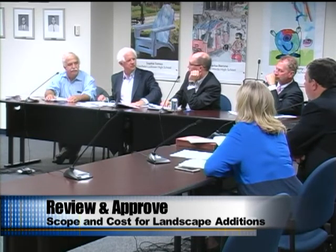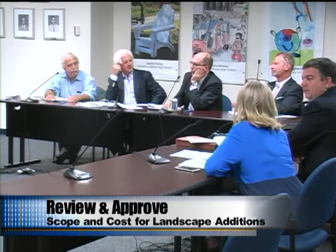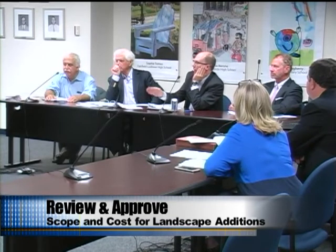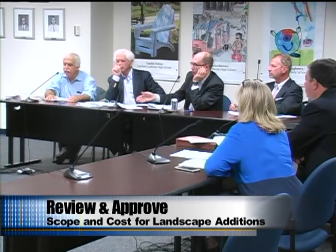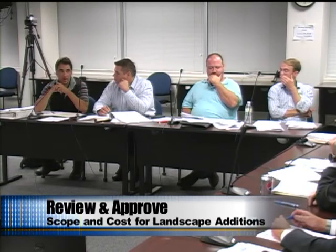Yeah, potential solution. Well, maybe. What's the latest that we can give you a yes or no on this, so that we could get this done in the fall? If we were to wait until the next meeting, after we power up the building and get a better sense of where we are with that, can we still get the landscaping done? Landscaping would be tough. This is kind of a drop-dead time for the landscaping. We have to have it all planted in roughly 3 to 4 weeks. So it's tonight or it ain't happening.